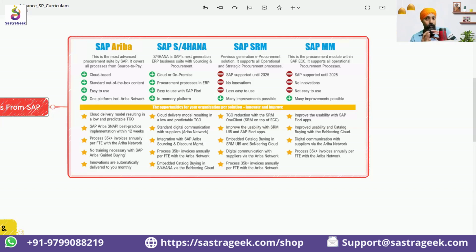So that is sourcing: identifying a vendor, negotiating a contract, negotiating pricing, finalizing the vendor and onboarding him. That is basically called sourcing. And once that source has been developed, once this pipe has been developed, continuously taking the material from the pipe is procurement, in layman language.